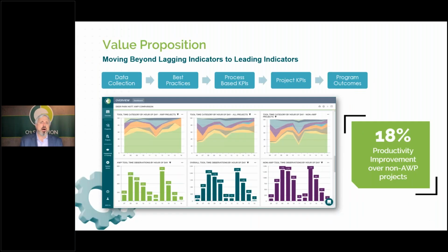So when we talk about the increase in productivity, one debate that's happening now within the leadership of CII is whether we need to kill this idea of the 25%, because it can be misleading, particularly if it's your first time doing AWP. To expect to get a 25% increase in productivity the first time you use a new process or tool is not realistic or likely.